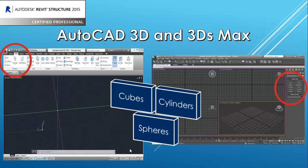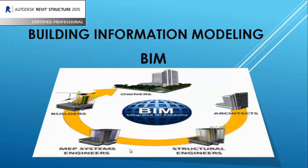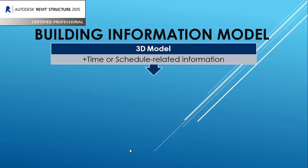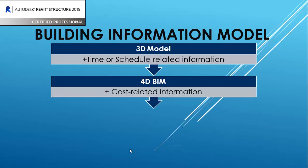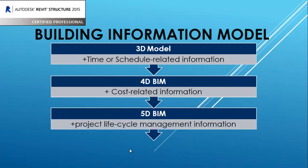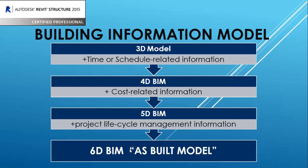Elements like cubes, cylinders, and spheres are 3D shapes used to build larger forms, but again, only the creator understands the purpose. Building Information Modeling uses a concept called the Building Information Model. A 3D model, when you add time and schedule-related information, becomes a 4D Building Information Model. When cost-related information is added, it becomes 5D BIM. Adding project lifecycle management information gives us 6D BIM, or the as-built model — and that is the main use of Revit.